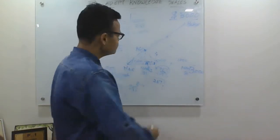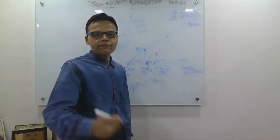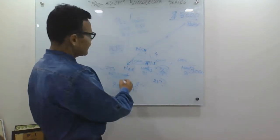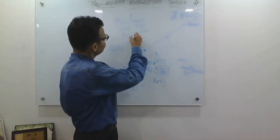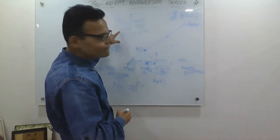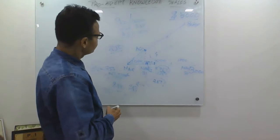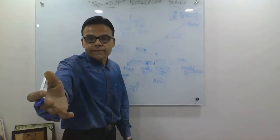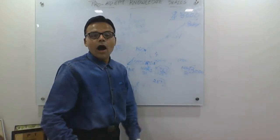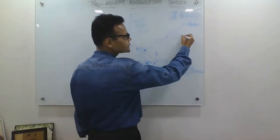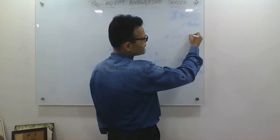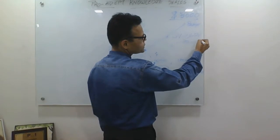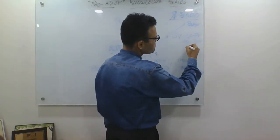So let me go back and give you three interesting aspects of this earned value. When we talk about these three values - plan value, earned value, and actual cost - there's something called schedule variance. Because as I say, you are already behind schedule, so how much is the variance from plan? So your schedule variance is nothing but earned value minus plan value. Your earned value in this case is 750, your plan value is 1000, so your schedule variance is minus 250.